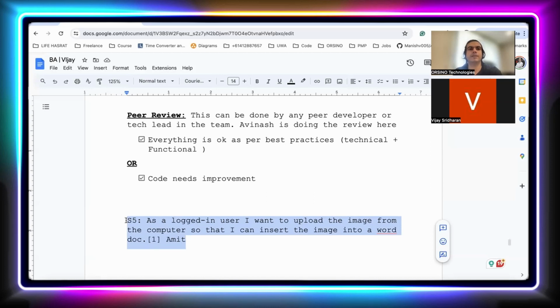No, that's good. So now here the Scrum Master comes into the picture. He will say this user story was just one pointer. Ideally, when we say this is a one pointer, the entire team has considered that they will be able to close this user story with one pointer, including development, testing, code review, and all those types of things, right? But now 3 days have already gone, and this user story is still under code review, or maybe under testing. Then the Scrum Master will come into the picture and say, boss, why is your user story not getting closed?